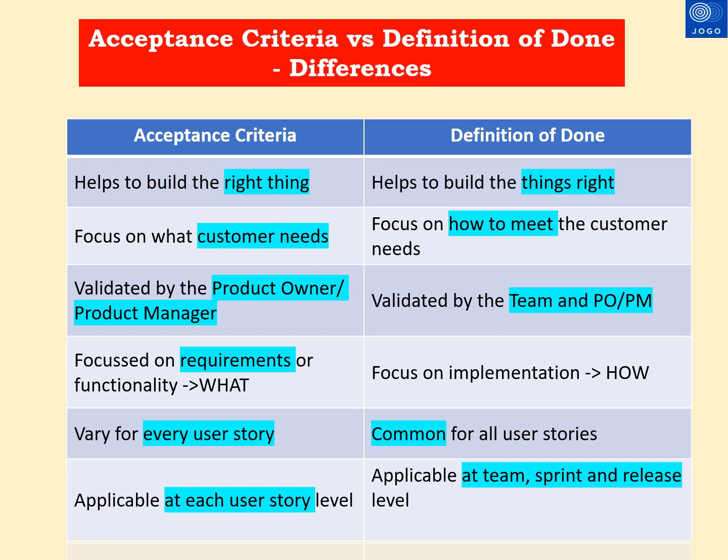Another important topic covered in this video is the differences between acceptance criteria and definition of done. You can see the key differences in the table — both are not the same. Acceptance criteria focuses on building the right thing; definition of done focuses on building things right, which is part of implementation. Acceptance criteria focuses on customer needs, while definition of done focuses on how to meet those customer needs and how to implement them.